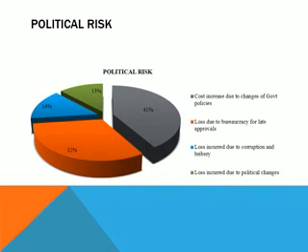This is about political risk. Cost increases due to changes of government policies, loss due to vacancy of late approvals, loss incurred due to corruption and bribery, loss incurred due to political changes.